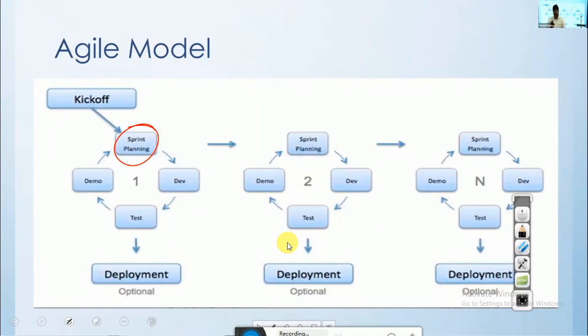Finally, all 2-3 functionalities are ready. Demonstrate to the Scrum Master after the testing. If I'm okay with the output, I'll connect to my client. I'll explain to my client, sir, this week, Monday to Friday, this is the work we made for you. This is the output. See, your homepage will look like this. Your customers can create the account like this. Your customers can log in like this. They can reset the password like this. Only 2-3 functionalities I am demonstrating.